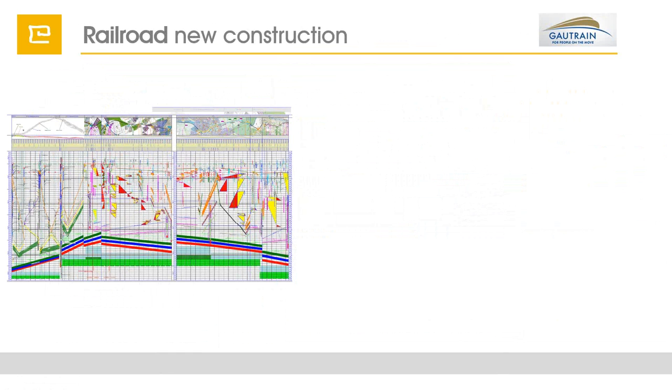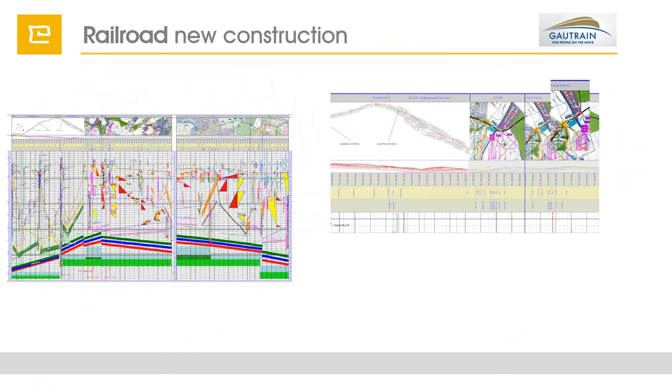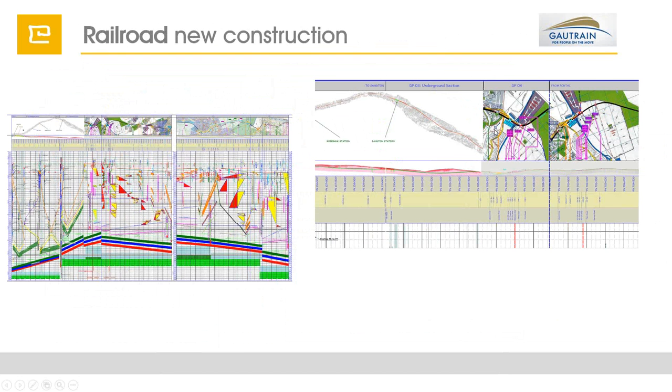The problem on this project was that it was not just something that was built new; it was partly a repair, and partly there were new sections built. The left part is done underground and the rest is overground. Along the axis, we could not just count everything from 0 to 70 because each part has its own measurement system, so there was no constant distance axis. We solved this problem by making different columns, and each column was representing one part of the project.